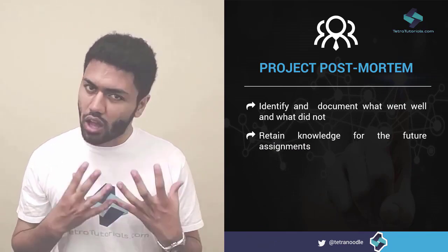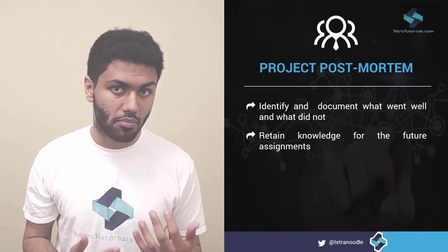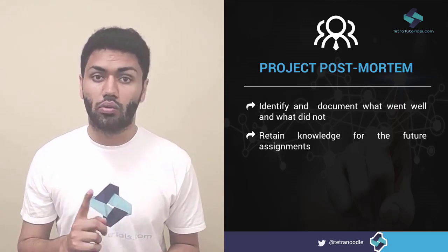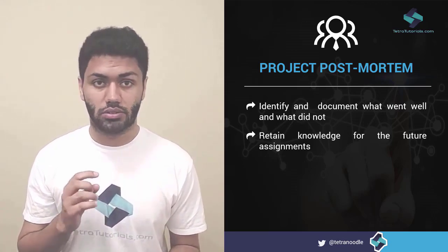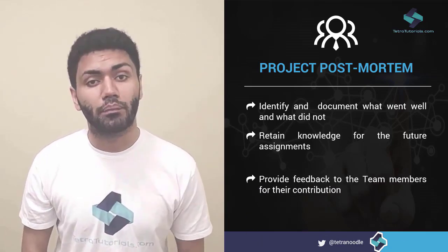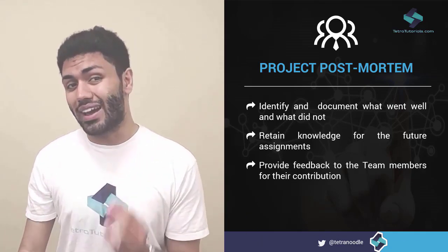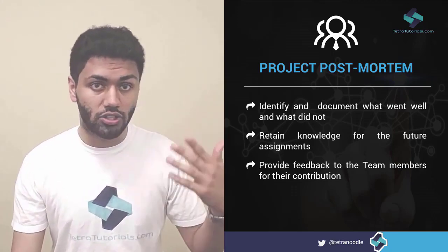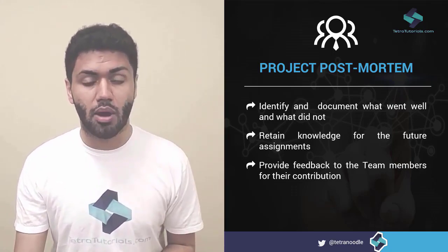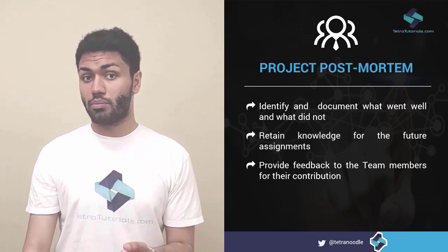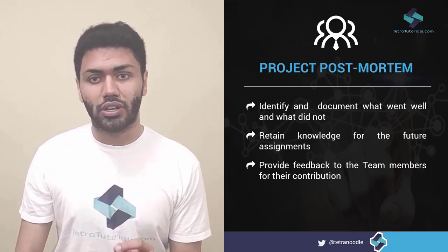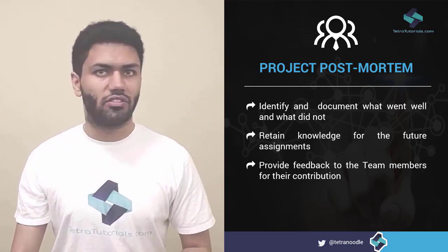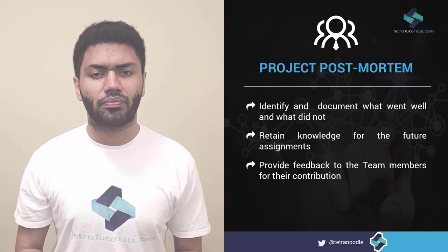There are generally a lot of learnings which originate from a project. These learnings may be technical or related to soft skills, strategies, and so on. It is best to execute this postmortem as soon as the project ends, while the memories of the project activities are fresh in everybody's minds. It's also very important for the project manager to encourage open and honest discussions without the fear of any repercussions.